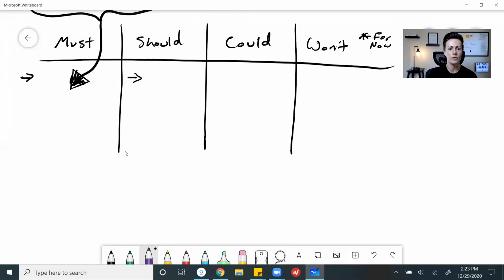Okay, so the first testing phase we add in happens right here, in between your musts and your should haves. Now, you might be thinking, if your must haves only focus on that key user and they only solve that first problem and you're not thinking about monetizing yet, then how can you test that, right? Well, the thing to remember is that, again, you have multiple phases of testing that you're going to want to go through. And the first is pretty simple. It's called alpha testing. And this is where you really are just testing the app's functionality.